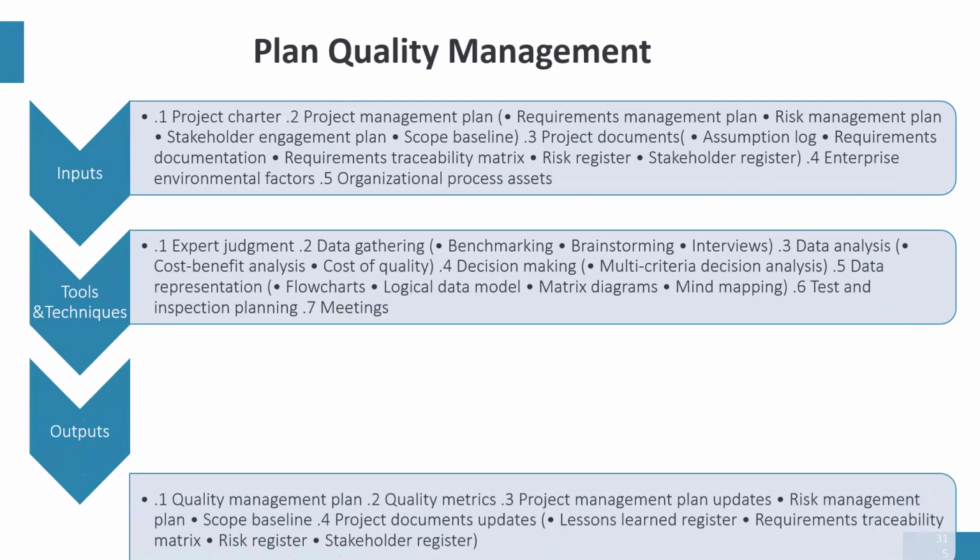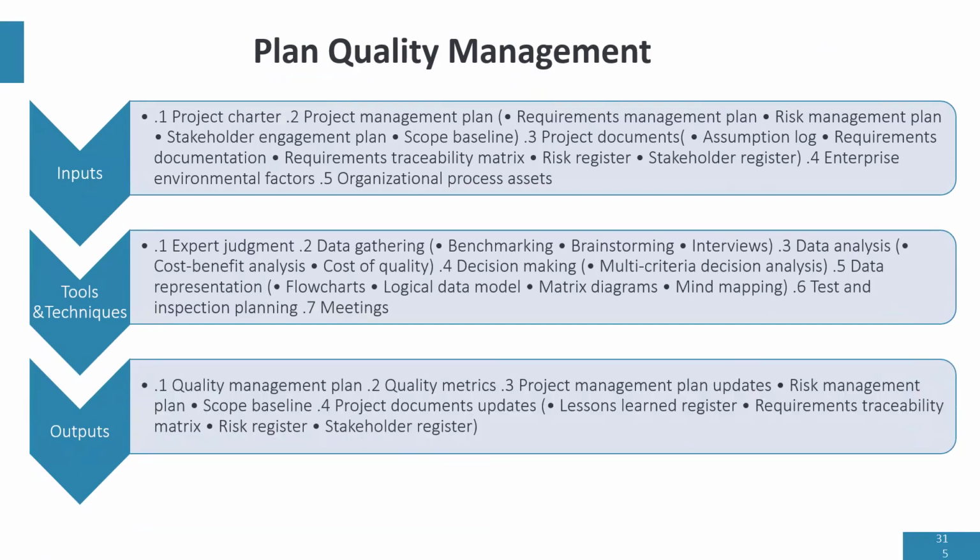Let's look at the process for creating the quality management plan. And of course, there are a lot of inputs, tools and techniques to look at, so we'll just look at some of them. In order to create the quality management plan, we can look at the project charter, which has high-level requirements for the project. Then, of course, the requirements management plan, which shows how requirements will be collected, managed, documented, and prioritized.